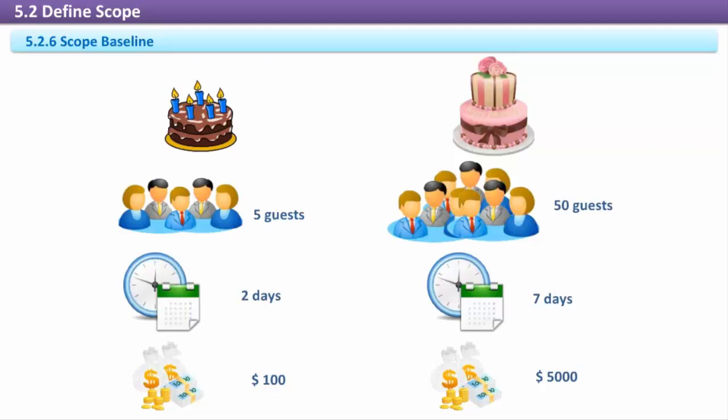Was our project successful? If we look at the original plan compared to what actually occurred, it took us 350% longer to execute the project and we exceeded our original budget by 50 times. However, the original plan is not what our comparison should be based on because the scope of the project changed midway through. Our comparison should be based on the 7-day schedule and budget of $5,000.